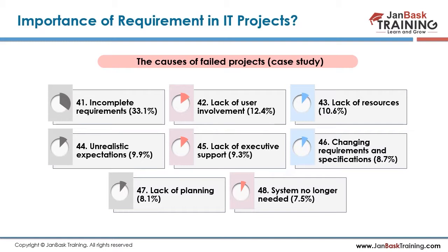What needs to be taken care of, how you are going to develop it, what sort of things will be there, how you are going to negotiate on which factors will be applicable and which are not. All these thoughts need to be in the picture. This is how you can safeguard them. Other than that, what you can create, and we'll come to that, is a requirement traceability matrix, where you track the requirements against the functionalities that are there. That is helpful when you're tracking requirements related to one particular thing.